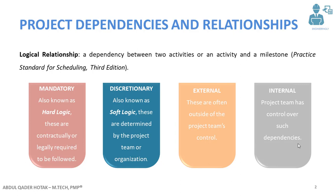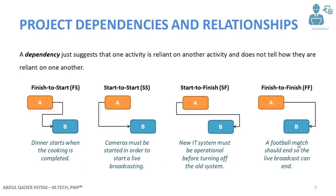External dependencies are those which are out of the project team's control — the project team has no or very little control over such dependencies. For internal dependencies, they are totally under the project team's control and the team can decide about them.